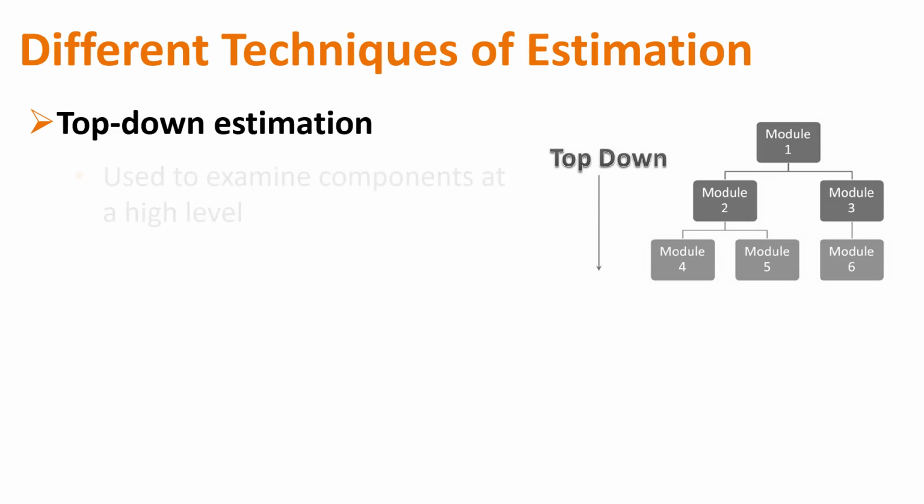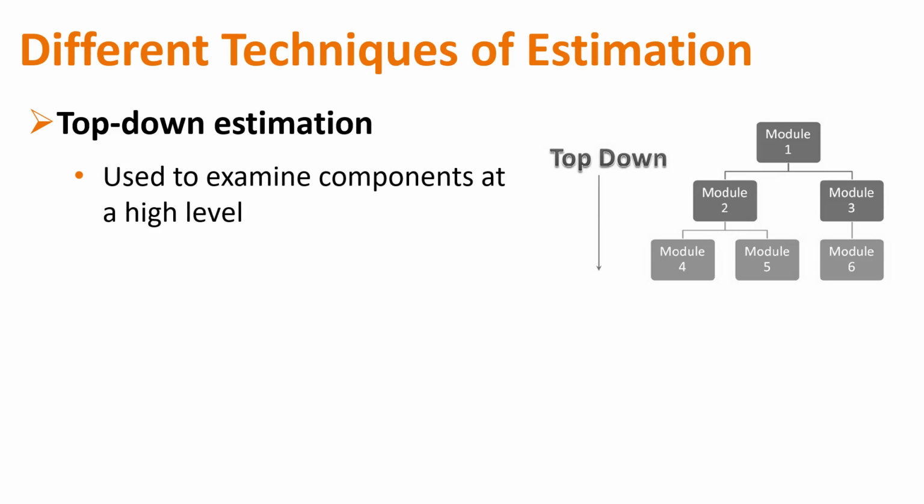And so top-down estimation is usually done by people in upper levels, and they're guessing at what this thing will take, high level. They're usually saying it should take about 6 months, or it should take about 2 years. And they're not saying, I don't know. I mean, we don't know what we don't know, and it could take between this and this, right? So I recommend ranges, especially if you're doing top-down. Top-down should never be shared without a range.